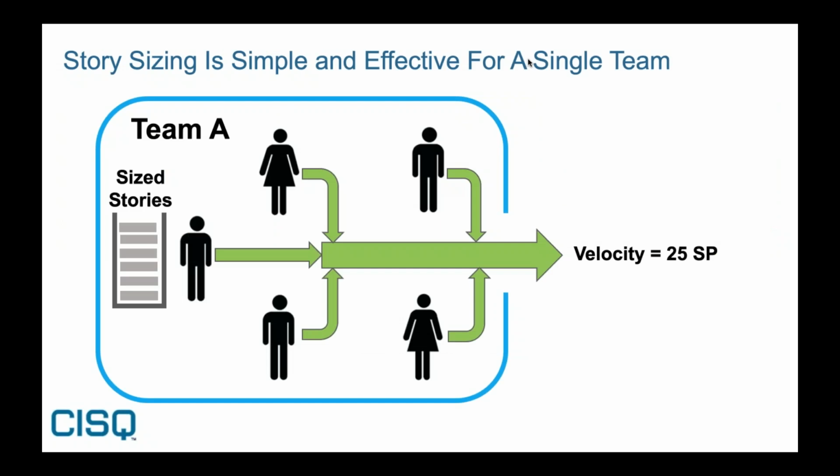So let's get into what we do at the moment in terms of this question with Agile. So Agile uses a wideband Delphi technique, story sizing. The story sizing is very popular. It's one of my favorite ways of sizing. Human nature is actually better at sizing relatively than it is from an absolute perspective. So story points and story-based sizing works very, very well for individual teams.